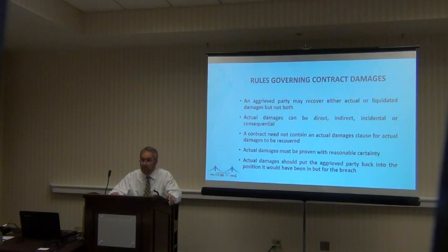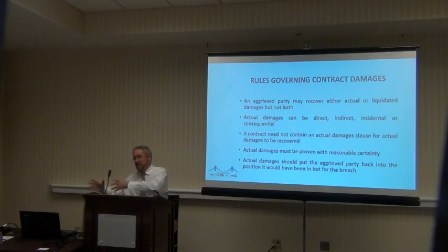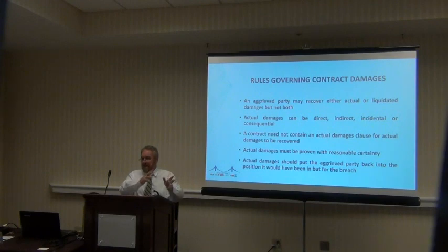I mean, if there was a fire and somebody was at fault, and the fire also caused the job not to get finished by the required date, you would have both late completion damages and the actual property damages as well. And the existence of a liquidated damages clause would not preclude you, as either an insured or an additional insured, from making a claim under the policy.